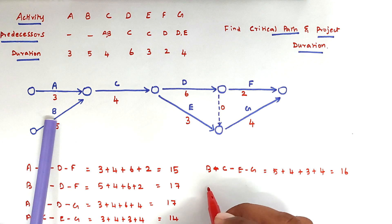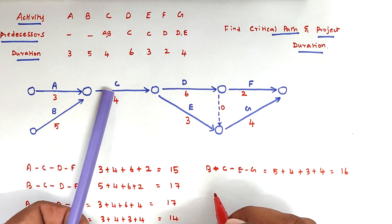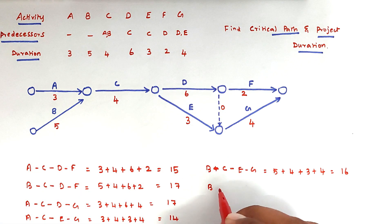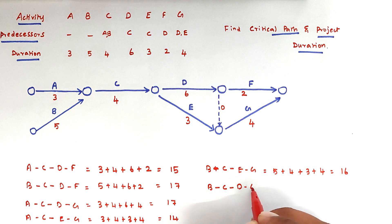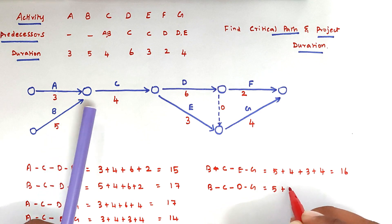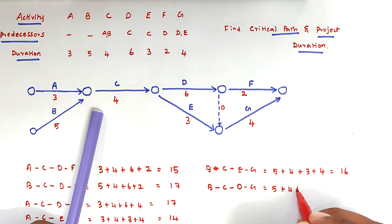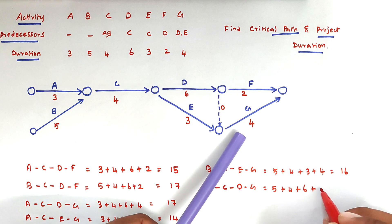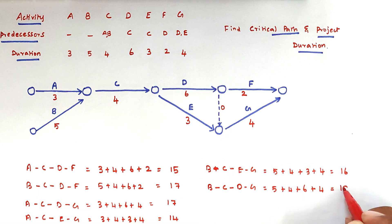The next path is B, C, D, G with a duration of 5 plus 4 plus 6 plus 4, which equals 19.